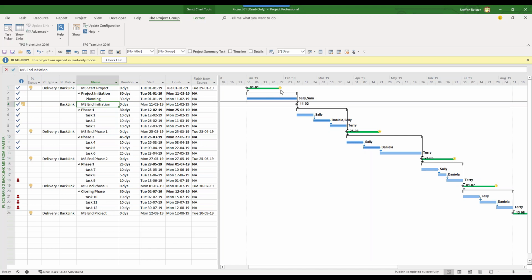But you can see here, these are now additional information from the program plan into the sub-project, where you can see I got a due date from my program manager, which is fairly 4 weeks later than I have planned my project. And therefore it tells me, okay, and that's normal project client configuration. There is a green bar, so I'm in a green status compared my planned dates to the due dates of the program manager.